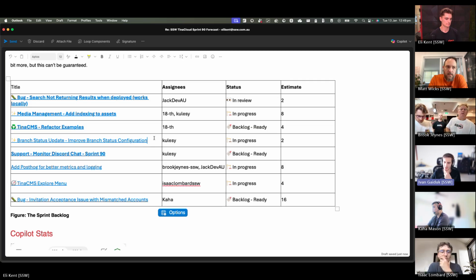Essentially, we had one about not handling the brackets in an email template properly, and a few of a similar nature, but it will take a lot of effort to fix those. Jack and I had a general estimate, and it's probably another epic to rewrite or at least readdress the way we parse Markdown in general. So while we've looked at them, that's not something we can easily fix right now.